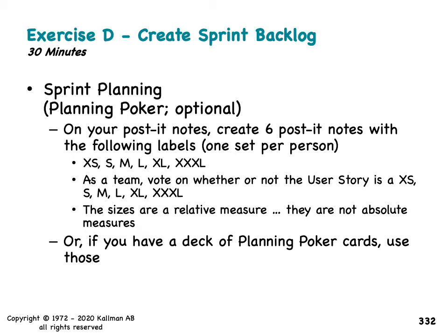I had a team test this a few years back, with some really talented AI team members, and they were able to do the points and then we started doing in parallel, showing them the curves of the burn-up charts based on just the number of user stories that they were doing each sprint. And the curves were nearly identical. The teams didn't believe me that that was going to be the case. But after a couple sprints, they came back and they said, you're absolutely correct.